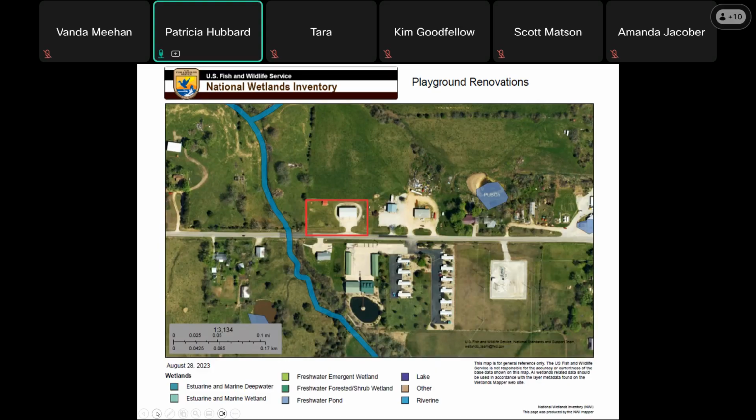If there are any wetlands from the legend marked within the project area, or ones that the project might affect because of soil discard from construction sites, you will need to contact the U.S. Army Corps of Engineers to see if you will need a 404 permit. There's a template letter for the U.S. Army Corps of Engineers on page 21 of the guide or Adobe page 44.